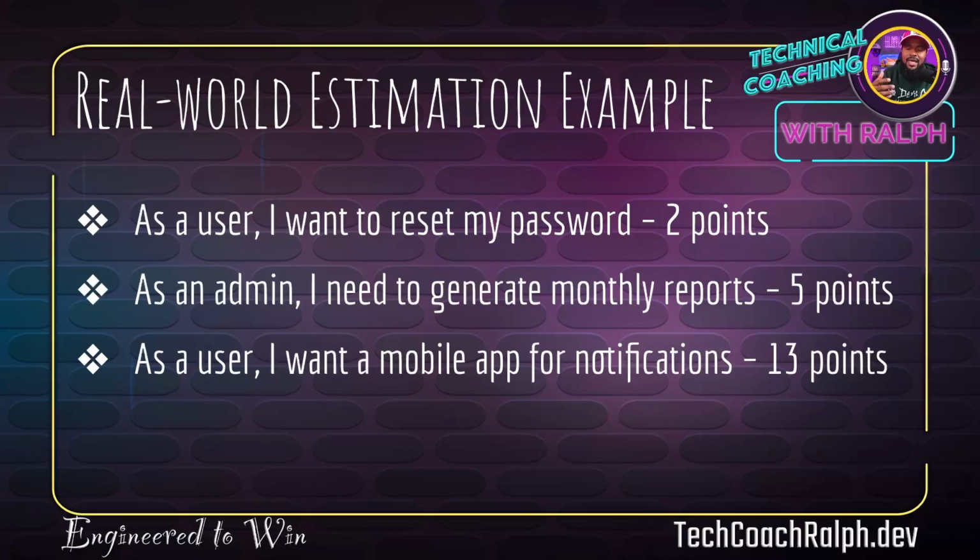As I mentioned before, when a team is working together for the first time, they might actually point higher, and as they start to build some cohesion, their points might start getting lower. So the pointing and the Fibonacci sequence you choose when pointing your tasks and stories are going to gradually get lower as the team works better. But then let's say a new member of the team joins, or a couple of new members, the points might get higher again because there's going to be some time to adapt.